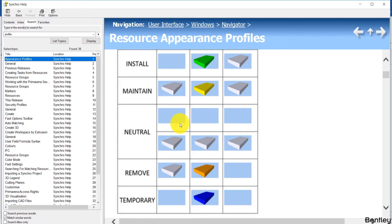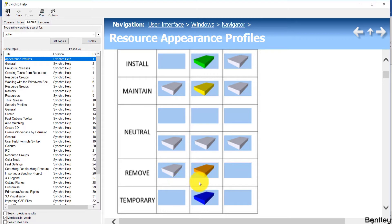The Neutral profile doesn't change the appearance of the resource. If the resource is only assigned to tasks with Neutral profile, it will never be visible. If it is assigned to tasks after an Install or Maintain, it will retain the existing color — it is only used for informational purposes. If you use the Remove profile, before the task it will be in its original color, during the task it's in orange, and after the task the resource will be invisible. If you use the Temporary profile, the resource will only be visible during the task. We use Temporary profile for construction equipment like the fog lift and crawler crane, Remove profile for demolition projects, and Maintain profile for renovation projects.